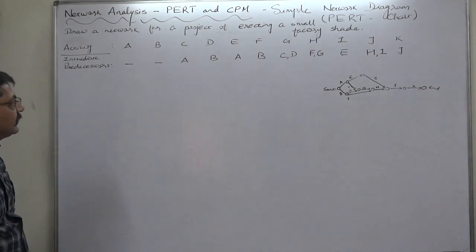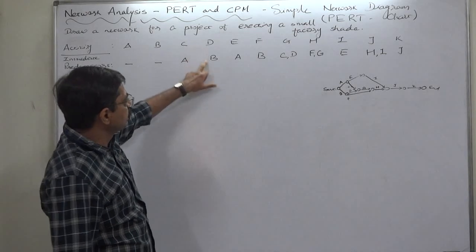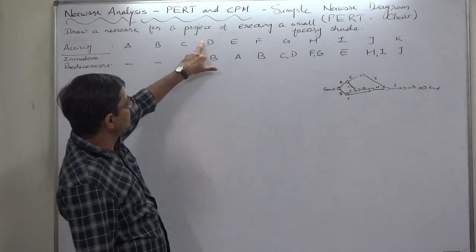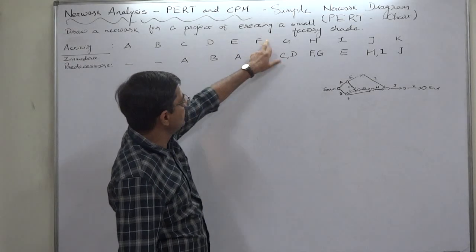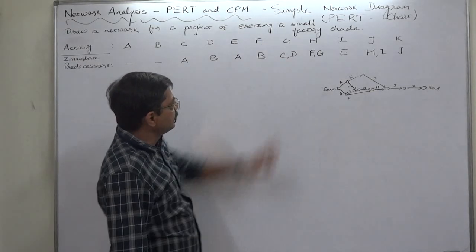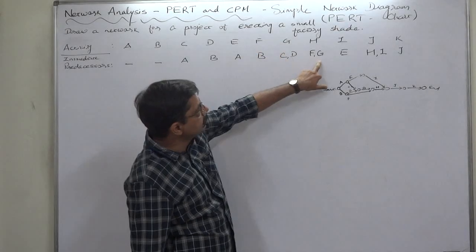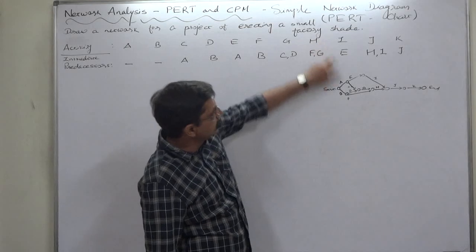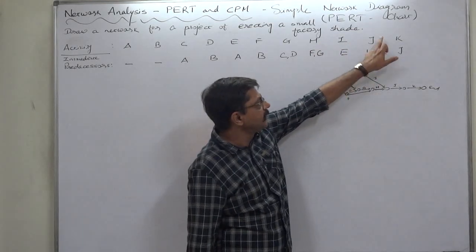B is predecessor of D. A is predecessor of E. B is predecessor of F. C and D both are predecessors of G. F and G both are predecessors of H. E alone is predecessor of I. H and I both are predecessors of J, and J is predecessor of K.